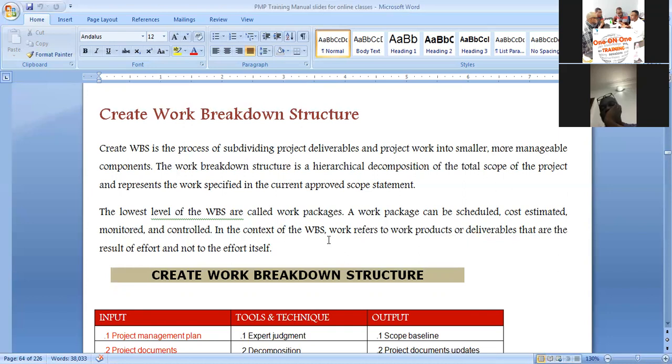Then we should carry out commissioning by using natural gas in the pipeline. Then they asked us to thoroughly clean the pipeline. And if we do that, we should demobilize the equipment. And then number 10, we should submit reports. This is the work breakdown structure.